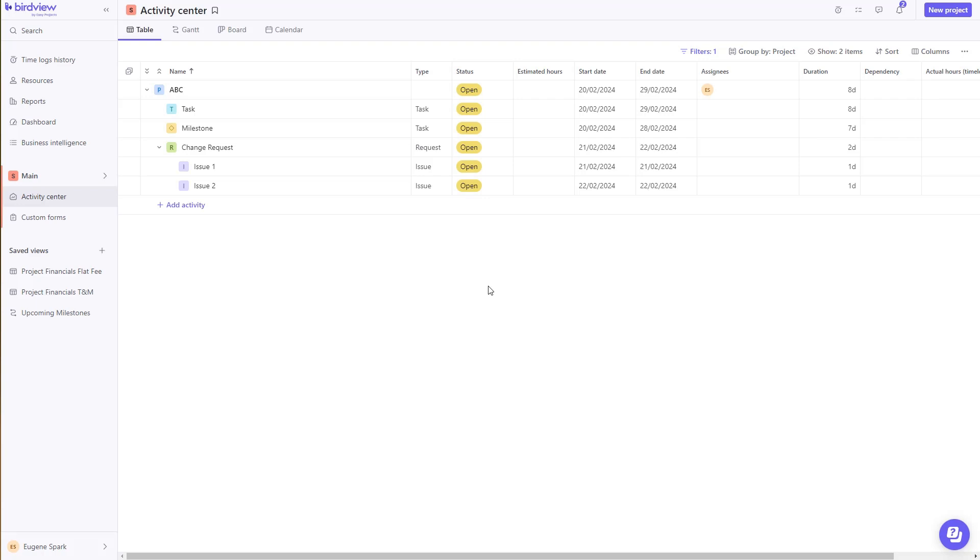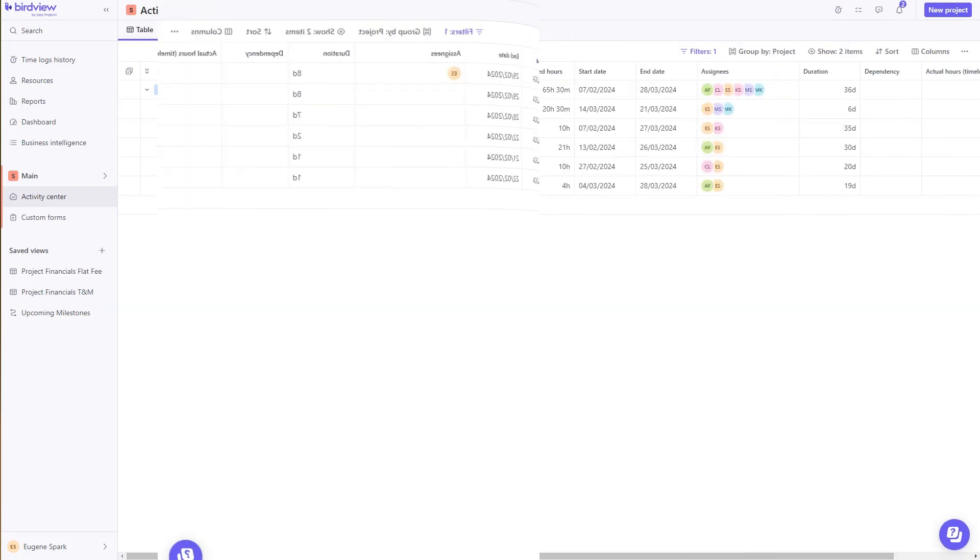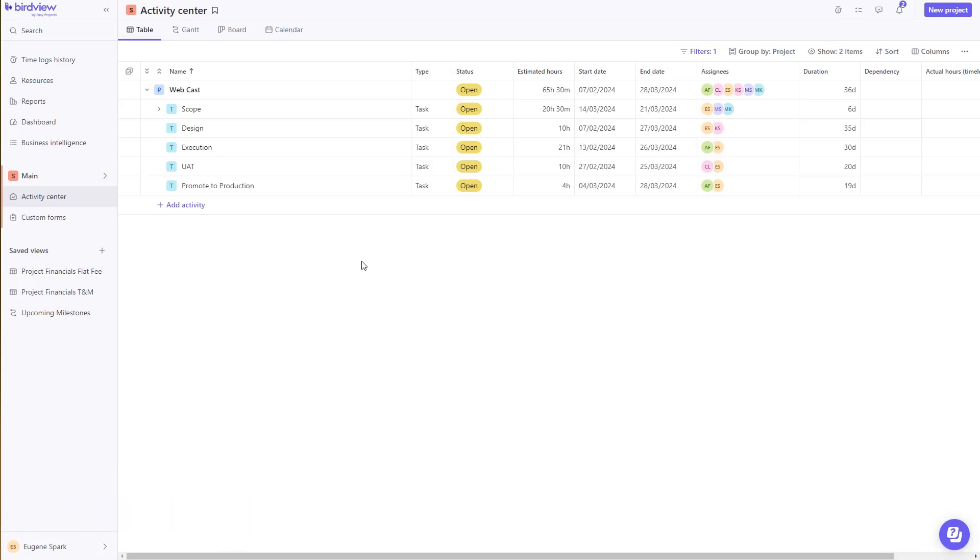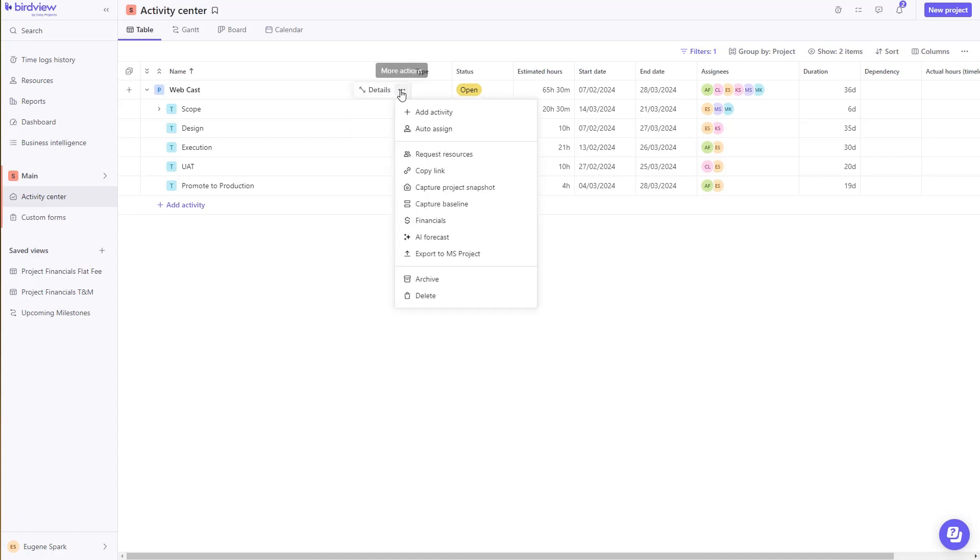Next, we'll take a look at some of the advanced features BirdView has to offer. As a project manager, if you need to capture baseline to see how your project is trending against the baseline, we have you covered.